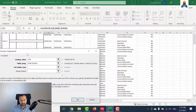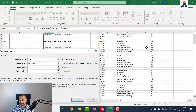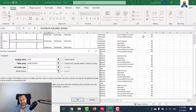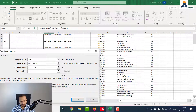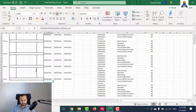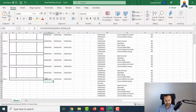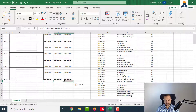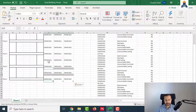Once Excel finds the activity ID, this is the column index number - give me the third value of the table. I am searching for this table: activity ID, activity description, activity percentage complete. I want to extract the activity percentage complete, so this is the third column. Press 3. And for range lookup, we will keep it 0. I will copy and paste for the whole sketch and show the percentages under the activity ID.